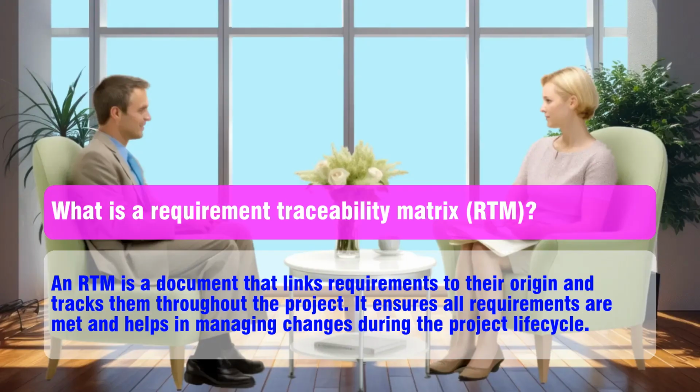What is a requirement traceability matrix (RTM)? An RTM is a document that links requirements to their origin and tracks them throughout the project. It ensures all requirements are met and helps in managing changes during the project lifecycle.